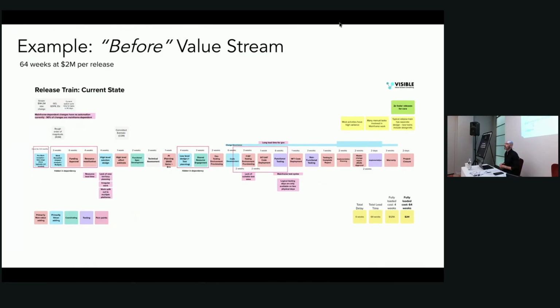What I also consider when I'm thinking about hotspots is the upstream versus downstream. If I have a hotspot upstream, I'm going to focus more on that, all things being equal, than downstream, because garbage in, garbage out, right? If I can improve upstream, there's much more likelihood that I have quality flowing downstream and I have less problems downstream. So I will tend to focus more on upstream concerns. So you can see a couple different things that are a little bit different here. The profiling of the types of activities.